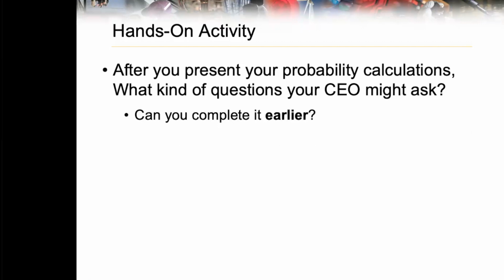I can delete some tasks if I can, right? What else can I do? I can change the nature of some of the tasks. I can give more time if I have it. I can add more people if I can. Yep. Make people work longer hours. Oh, I don't like that, because then there will be accidents, there will be injuries. Okay. So that is tricky.